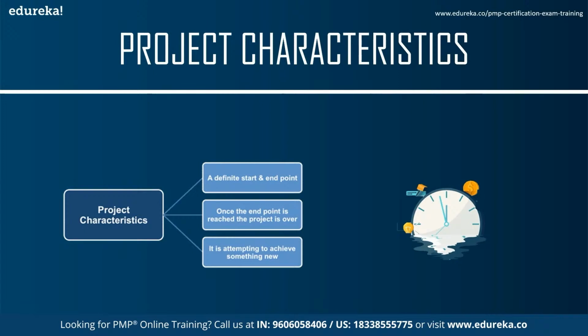So the first question that you would ask yourself is, is it unique? Yes, because the kiosks do not exist in the local grocery stores. This is a new way of offering the company's services to its customer base. While the service the company is offering isn't really new, the way it is presenting its service is.